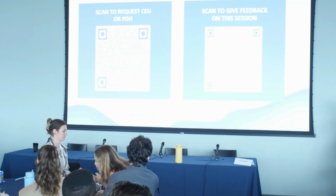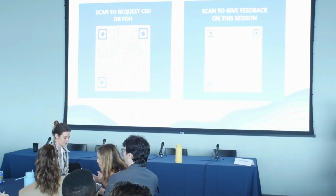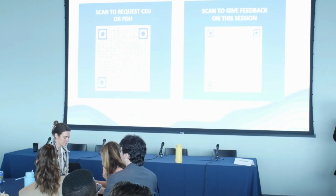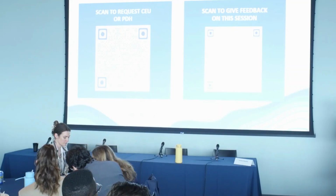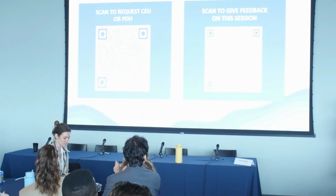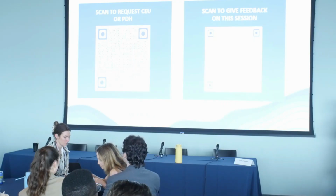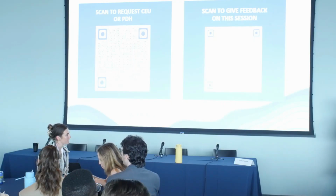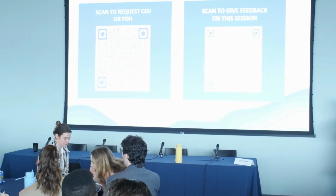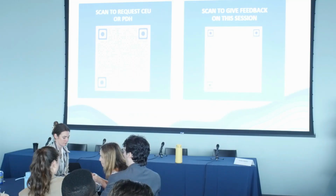So we had to go through 3 layers of permitting to do what is a fairly limited amount of in-water work, which is really isolated to the Pier Inlet work. But going through that review is a multi-layered, similar review where comments often don't line up. Comments are often conflicting, and it's challenging to determine how you're responsive, but also how you're responsive and maintain your design vision, and you don't modify it so significantly that it changes into something else entirely.